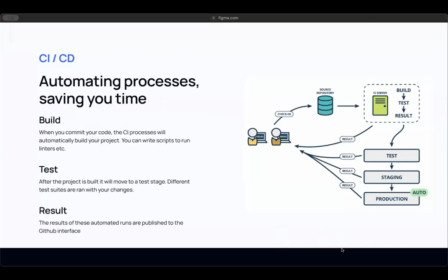I covered it a little bit. You may have seen those green checks and the red X on the unit test and UI test suite. Whenever you make a commit into your branch and there's an open PR with our process, we will run a few things. We will build the application to ensure that it can compile. The next thing we will do is run various test suites around it. Sometimes we have integration tests, sometimes UI tests, and unit tests. Unit tests run every time, UI tests run every time, but the integration test suite runs before we do our release to production.